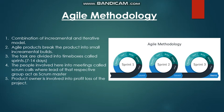One of the most important interview questions about Agile is: what is the testing process followed in your project? In that case, you explain the entire Agile process: the product owner prepares backlogs, then sprint planning and meetings are scheduled, stories for sprints are selected, sprint cycles are decided, estimation is done, story points are added, developers add their tasks, and finally daily scrum call meetings are held with designated time periods so everything is finished on time.